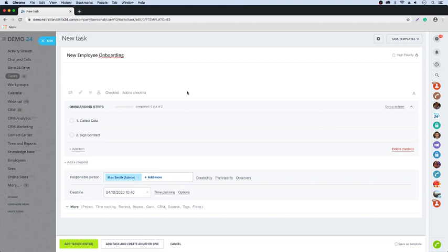It's just such a quick way of being able to create tasks that are repetitive for your company, because like I say, when we sell an on-premise license of Bitrix, we know that an installing process has to take place. So we have a task template for Bitrix self-hosted installation, and then we have a series of steps that we follow, a series of items in the checklist.